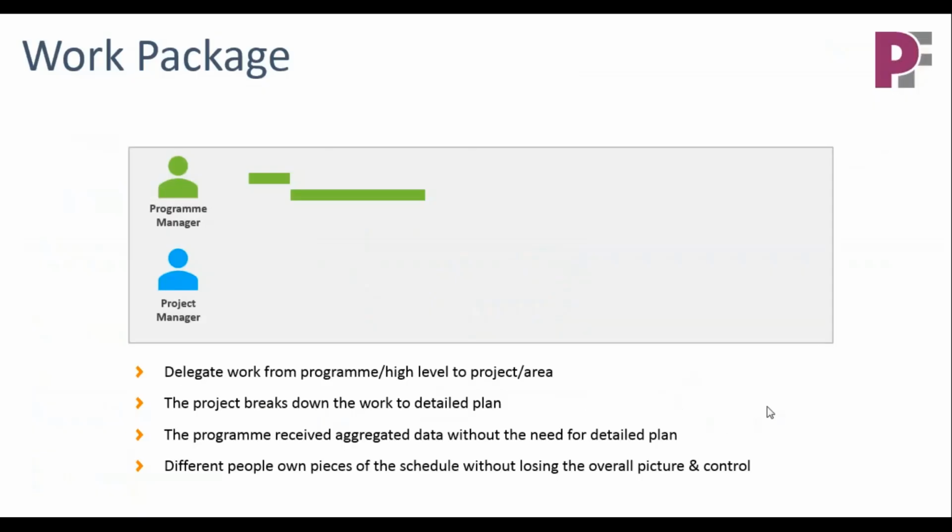So the work package is another link type that MasterLink offers, but it's a more advanced feature which allows us not just to represent one task, but to represent maybe an entire scope of work, or sometimes also looked at as reflecting a task, not just by looking at the start point or finish point, but by looking at both. So it's kind of a reflection, a copy, if you like, of another task that is managed by another work plan.